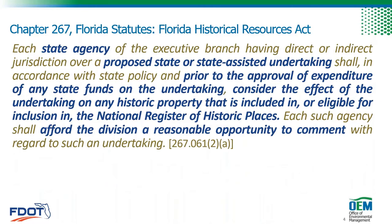Moving to Chapter 267 — these are the state-level regulations, actually modeled after Section 106, and as a result the processes for compliance are very similar. Under Chapter 267, state agencies must take into account the effects of their undertakings on historic properties prior to the expenditure of any state funds. State agencies must also afford the Florida Division of Historical Resources, or DHR, a reasonable opportunity to comment on the undertaking and its effects. These regulations are really similar but there are a few minor differences that change the way we consult with other agencies.